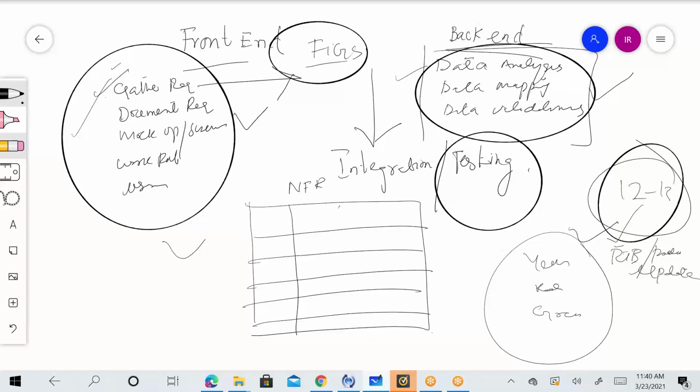And then when you said he opens the application, are you opening your laptop and typing that information, or taking a printout and writing it? No, I'm just taking a printout and writing whatever rough version he's talking. I'm taking notes on it, going back to my desk and inputting all that information, rephrasing it, then sending him this document again, asking him to approve the non-functional requirements. That should be done through official email. Once he reviews and reads it, he will let me know that he approves these non-functional requirements.